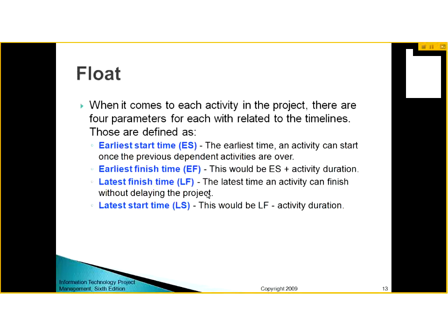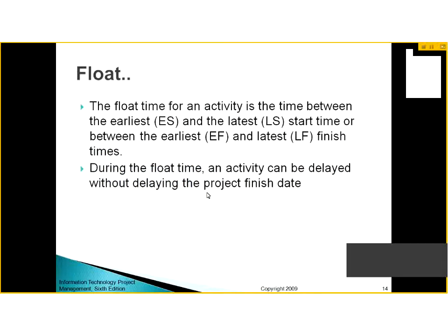And latest start time is latest finish time minus activity duration. And when you say float, the float time for an activity is the time between the earliest start and the latest start, or between the earliest finish and the latest finish. So this is called the float time. And during the float time, an activity can be delayed without delaying the project finish date.